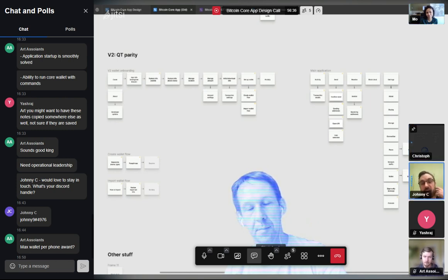So that'll be a bottleneck, onboarding and then the navigation, and then you could start to parallelize the rest of the features. Yeah, totally. There's some stuff that's secondary or that can come later, for sure.